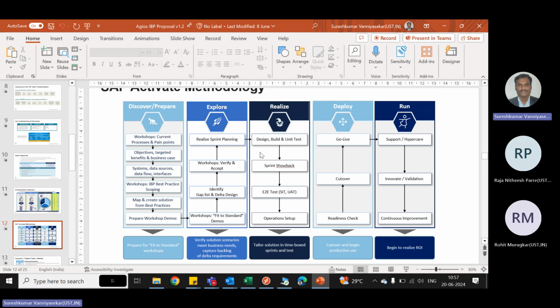Actually, the plan has to be prepared at the beginning itself, but there will be a little bit of changes, so you can prepare or modify the project plan. Then you can set up milestones. After 2 weeks we will show you the master data in the IBP system. Then on milestone 2, or sprint milestone 2, we can show you the forecast models, the ABC classification profiles, and the time series analysis.